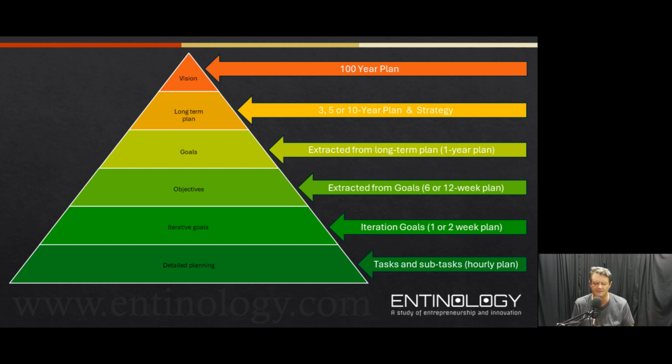The detailed planning, which is then done down to subtask level and hourly planned. Now Agilists are going to get a real heart attack, because how on earth can you plan hourly work? The reason you do that is simply to ensure your maturity in your planning, because the planning is done by the individuals themselves that are going to do the work, which leads to massively increased accuracy in planning.